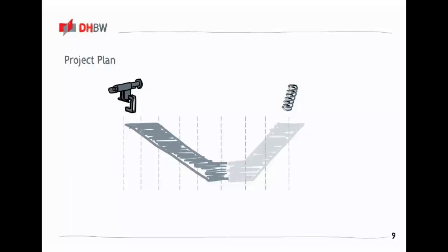The strength of the V model is that it forces to check the progress made in the design continuously. In this way, the dimensioning of the elastic properties of the spring that the producer of the device has made at the beginning of the project is validated when the buyer of the device tests if the spring complies with the mutually agreed requirements at the end of the project.